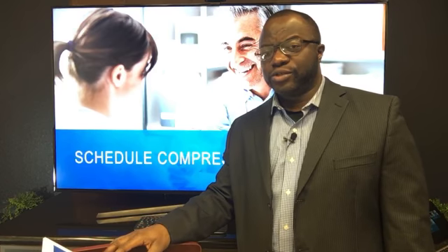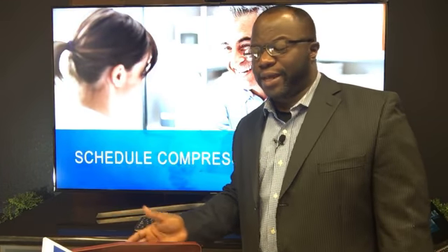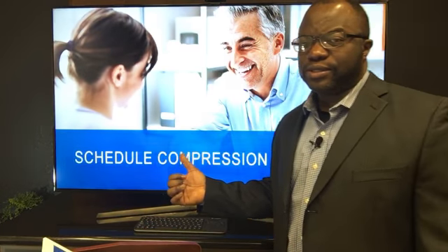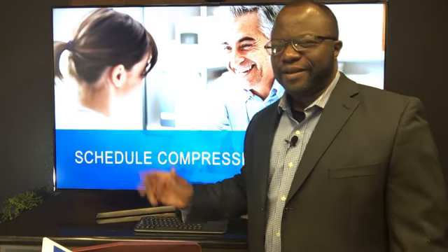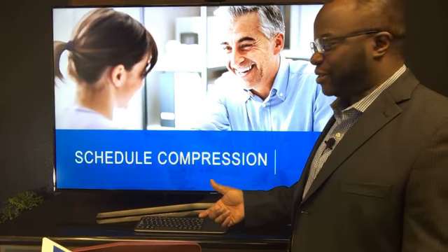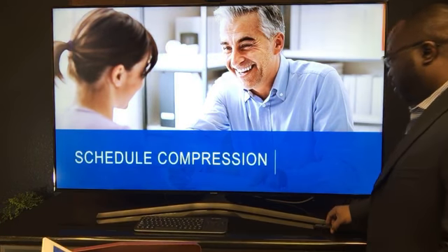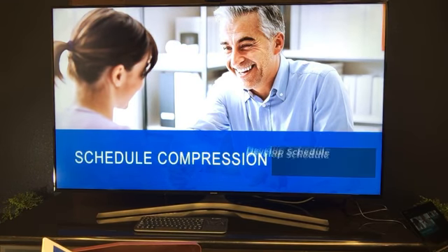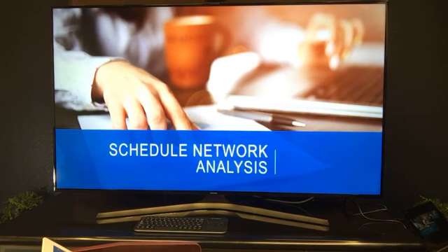But if you're in monitoring and controlling, it will make it clear that your project is live, and as a workaround or some other type of plan, you decide to add more resources. That will be controlling. I use the word controlling because it's less of a mouthful than monitoring and controlling. So you're in the monitoring and controlling process group, and you decide to add resources for that reason. All right? So schedule compression, know your crashing, know your fast tracking. Develop schedule, control schedule. Okay?